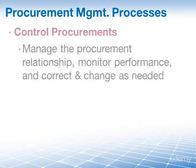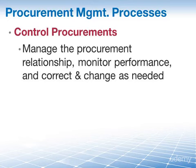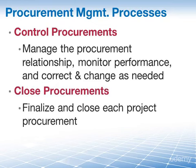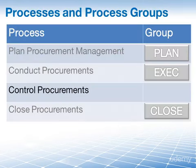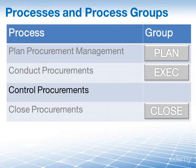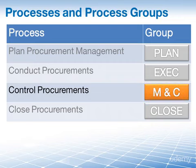From here, we move on to control procurements — the process of managing procurement relationships, monitoring contract performance, and making changes and corrections as appropriate. And lastly, close procurements: the process of completing each project procurement. When it comes to the process groups, plan procurements management is a planning process, conduct procurements is an executing process, control procurements is a monitoring and controlling process, and close procurements is a closing process.